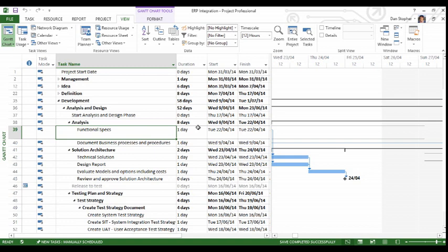because many risks and issues would be automatically getting pushed up to the program level, which would probably make for an oversupply of information in that sense. So the options, I guess, are either to flag them at the project level and bring them up through reporting. But the other option, which I may not have explained fully, if you use what I was calling option 2 or the mix of option 3, is that the project managers can be encouraged to raise program level risks and issues on the program site directly.